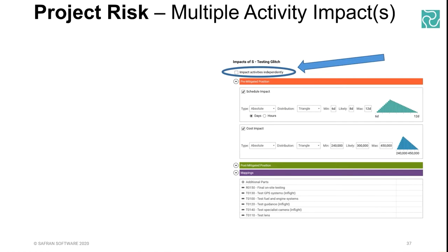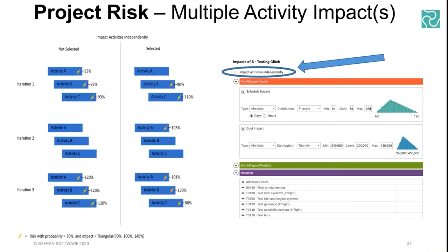But we can't ignore this thing here. So this was right at the top, and you might have kind of skipped over it, but there's a little toggle here that can have quite big ramifications on your modeling in terms of the correlation factor. So if you have multiple activities mapped to this, or cost elements as another one, how they behave can be toggled here.